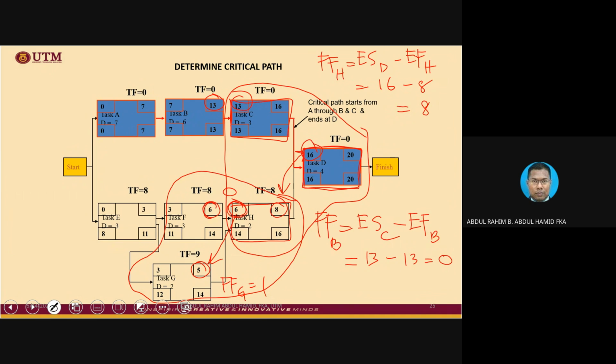If G requires more time instead of 2 days, the maximum additional time is 1 more day. Even if G is extended by 1 more day, the starting of H will go on as usual on day number 6, and it will not impact H.